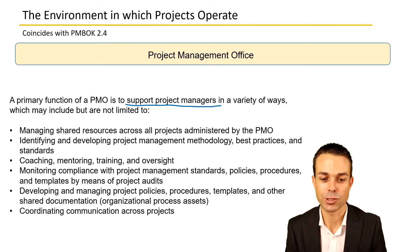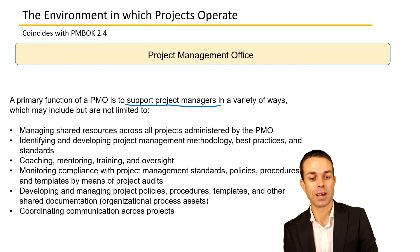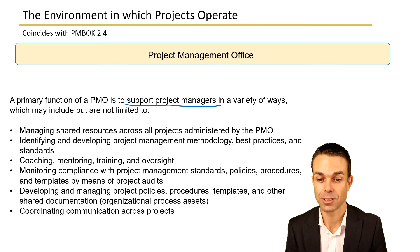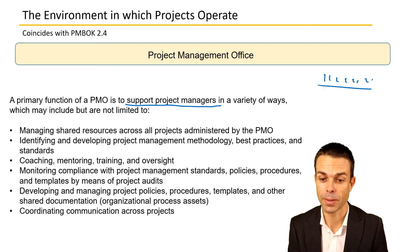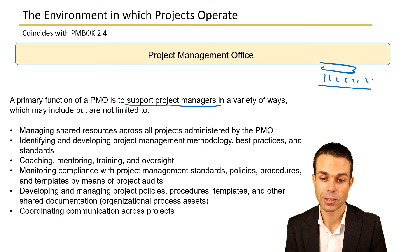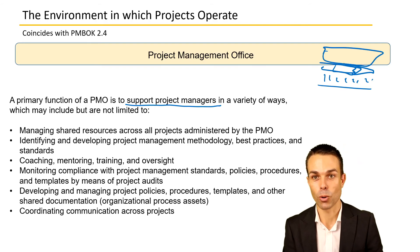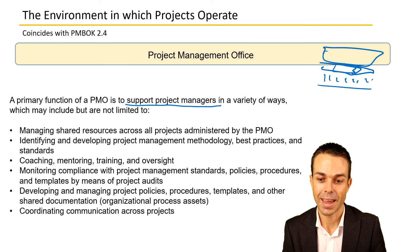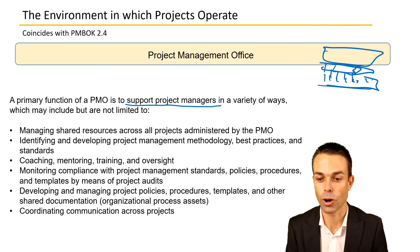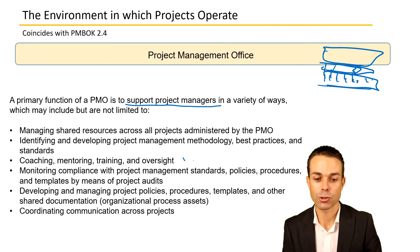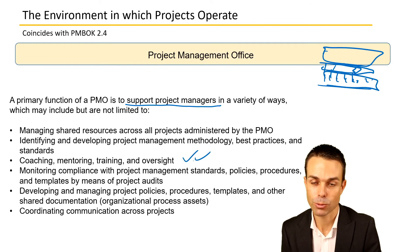When you have a PMO, the primary function — no matter what type it is — is to support project managers in a variety of ways. This includes managing shared resources across all projects. Maybe you've got 10 projects but only enough resources for six, so the PMO can keep an eye on all of this, usually from a program or portfolio view, and help manage the use of those resources across different projects.